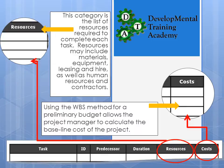The final two columns are Resources and Costs. In Resources, you list all resources required — not only your materials, but hired equipment, furniture, facilities, and all the people: the experts, hands-on staff, contractors, and so on. Once you've got all the resources listed, you can work out the costs. With your timeframes and knowledge of approximately how much each person and all the materials and equipment will cost, you can calculate the total costs of your project.